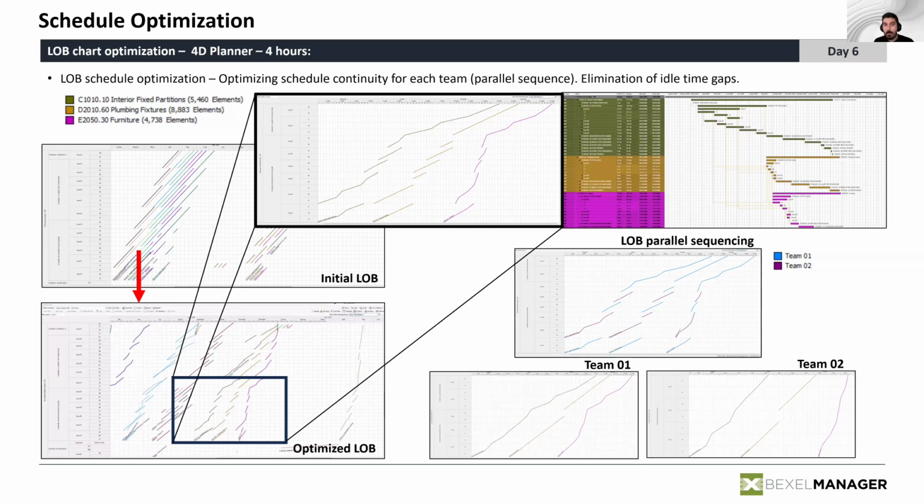So we had to know how to use the resources we have in a way that is not wasting the energy of the resource. We had to make sure that every team is working constantly on the project without idling time, because that's the most efficient way, the fastest way, the best for the project, the best for the contractor. So we ran a few analyses, and of course organized the line of balance graphs by subcontractor,